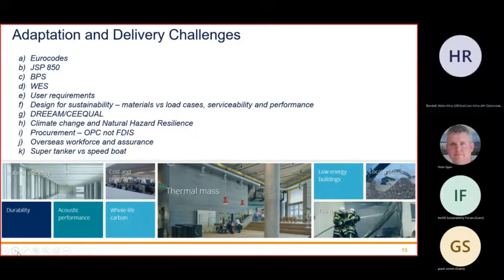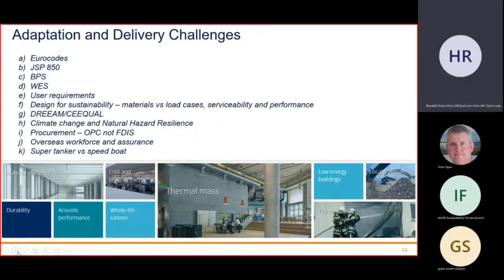Because at the minute, it's very challenging when projects or refurbishments are coming in and we're looking into their initial reviews through their gateways and through the balance of investments without data about how this has been applied, and without recognition that you can achieve those standards that we are effectively paying for. It's really difficult to make a balance of investment decision. And we can't recognise those benefits and feed it back to seniors that there is a significant benefit for them to be able to back spending additional CDEL, when obviously there are significant other pressures and capability is always there in the background to be able to want to spend the money.